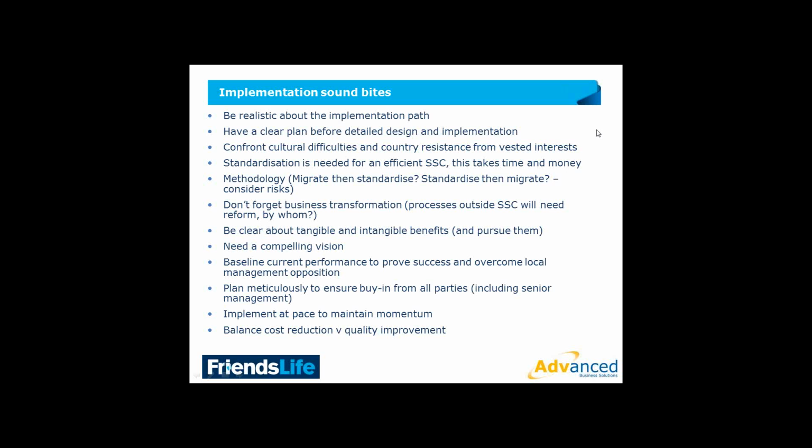And really, really key to do things at pace, because once you start drifting, you don't actually have that credibility. Senior management need to be engaged and sound ambassadors for what you're doing, because otherwise the CFO or someone else in the senior finance team will get buttonholed at the end of a meeting about a problem. He'll then think that something is dramatically wrong, and it's really minor, but if he knows what you're doing and that there are going to be some teething problems, he can defend you.